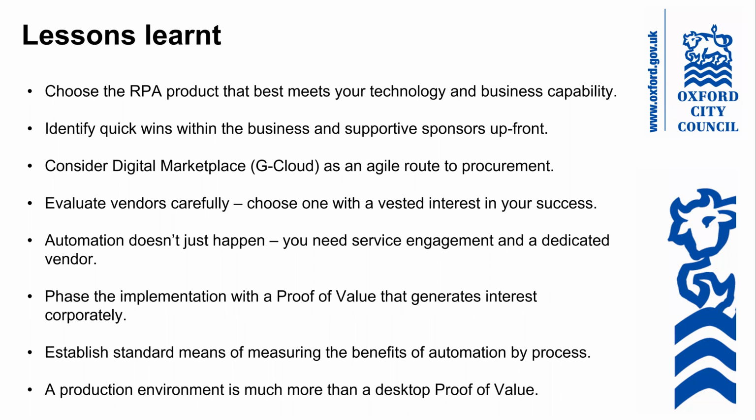And then when you move from the community edition to the production environment, you have to refactor the code that was written so that it works in a different environment. So these were things we weren't aware of. We are now. Whilst they will not have a big impact, just knowing that is useful, that you need to transition from proof of concept to live.